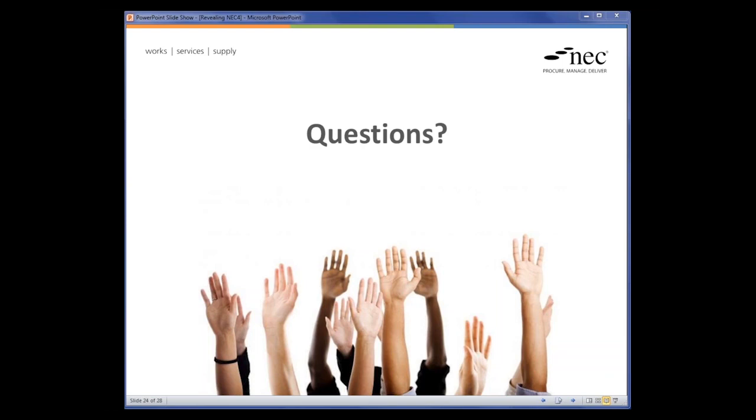Okay. Another question that's come in then is around the choice of a dispute avoidance board as the dispute resolution option. If that's selected, does that mean that you don't have adjudication? Can you just clarify how that works? Yes, the idea is that the dispute avoidance board will replace adjudication as a first level of sorting out issues. The board will look at the problems and give you a recommendation as to how to be sorted out. We've decided that in order to be useful as a board for avoiding disputes, that decision should not be mandatory.